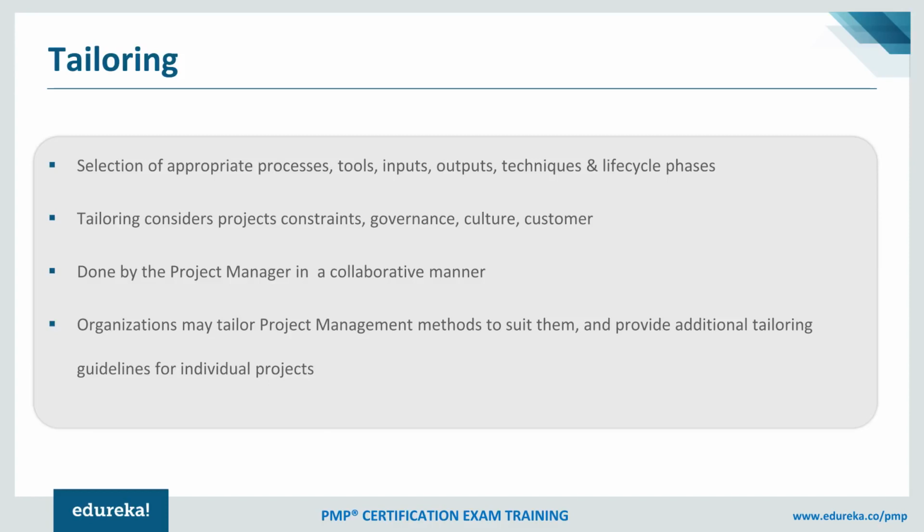To give you an example, let's say we were working on a project wherein the complexity was very, very high because there were multiple stakeholders involved. Not only that, there were stakeholders from different time zones as well. So we had to use certain tools which would help us ensure that all the stakeholders are collaborating well, because that was our biggest challenge. And hence we started using tools, Confluence and Jira. That helped us ensure that even though our team members and the stakeholders were distributed, we were still able to perform the tasks smoothly.